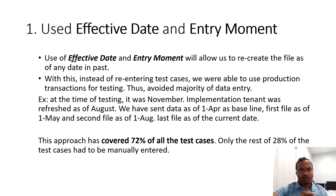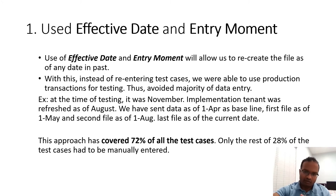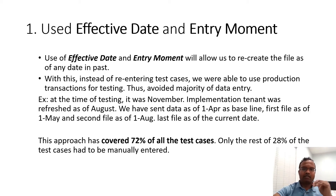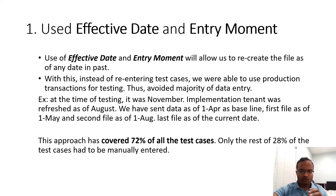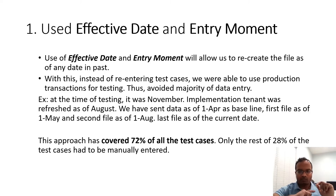This saves not only data entry time but also documentation and coordination. As an example, we did our testing in the month of November. I convinced the business to use April 1st data as a baseline, and we planned three rounds: Round 1 as of May 1, Round 2 as of June 1, and Round 3 as of today.